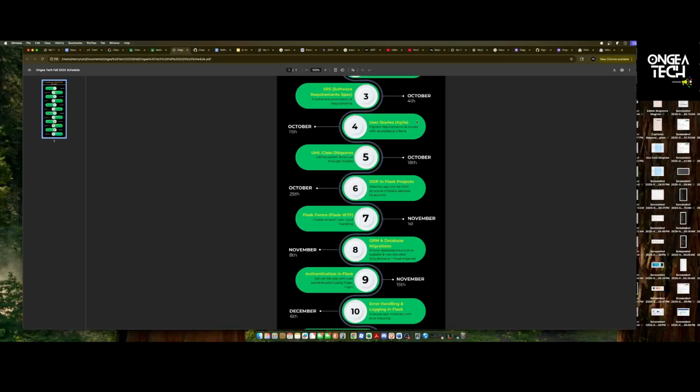We've actually been using it, by the way, all this time. We take a small chunk of work and we time box it. Usually it's a week or two weeks. Within this week, we will have an MVP, a minimum viable product, at the end.